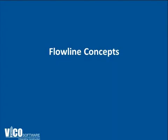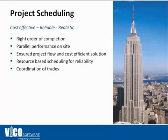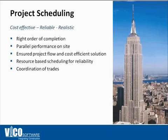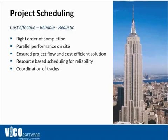Flowline is actually not something new. It was used in building the Empire State Building, which was built in just a little over one year. The builders had to manage thousands of people on a very tight site. They basically drew Flowline on paper with pencil, and it helped them ensure continuous flow and efficiently utilize the tight site and locations during construction.